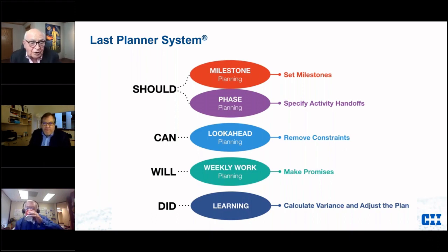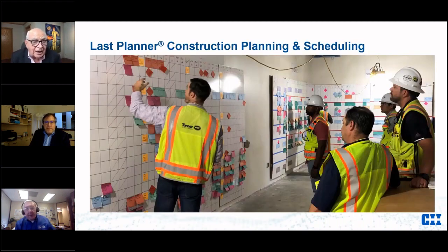Sure. Well, you actually can go to the next slide, and it's showing a construction, but these could be designers. So what we're doing here is those are the weekly boards. Every column is a day. The ones that are lined out are Saturday and Sunday. This team happens to meet in the middle of the week. And this is one team on the left and another team in the corner, and they're doing a daily check-in, 15 minutes a day, not 20. Did you do that? Did you do that? Did you do that? What are you doing tomorrow?